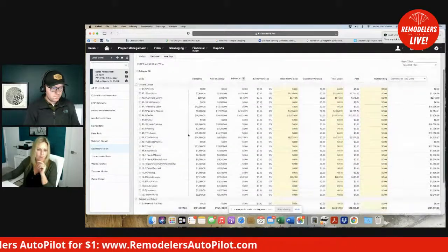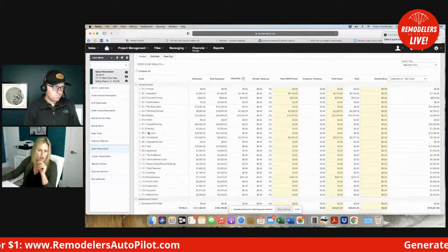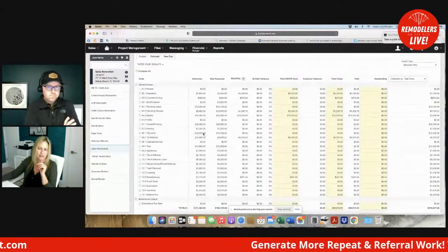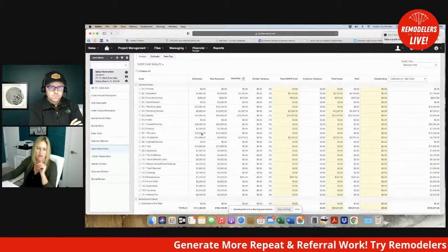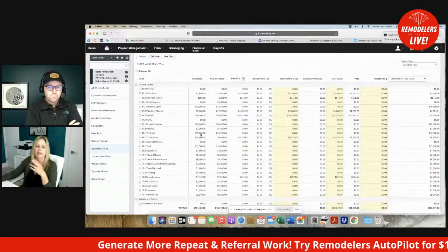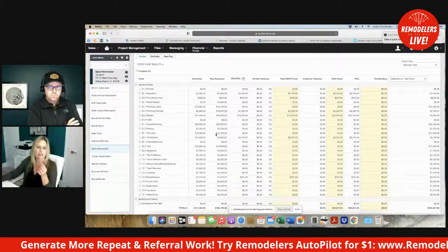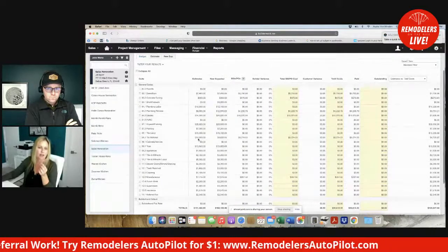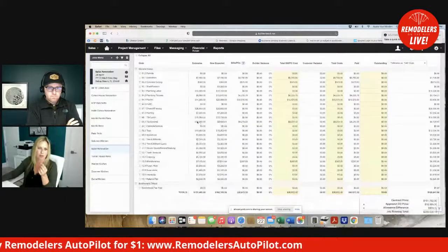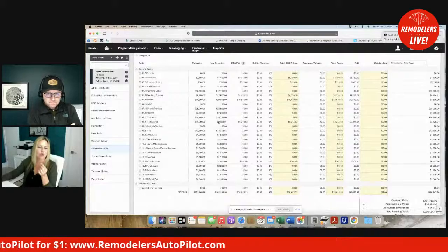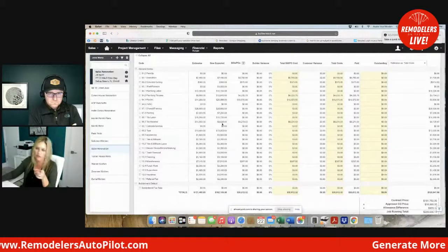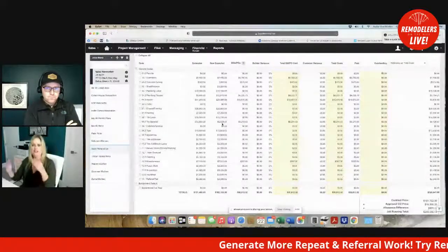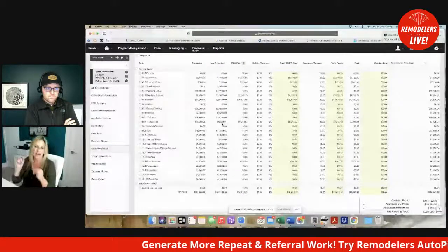So here, for example, our original tile labor price was $15,350. That's labor; material is what we're looking at. $14,000 was in the proposal. Okay. Now, based on the selection choices, it only goes in here when it's approved. So when it's pending and they say, no, that's not the tile, I wanted this one instead. Okay, fine. And you change it and whatever.